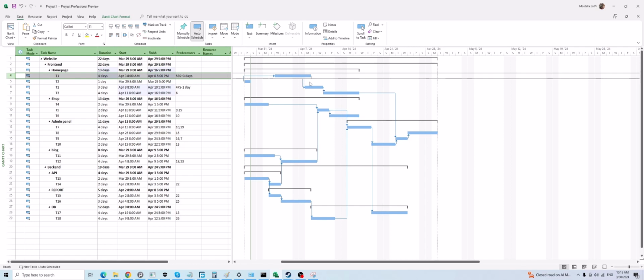We are using this link, finish to start, start to start, start to finish, finish to finish, to implement the logical dependency between tasks inside of the Microsoft project. For example, I have a task to fill a section of the floor with cement.